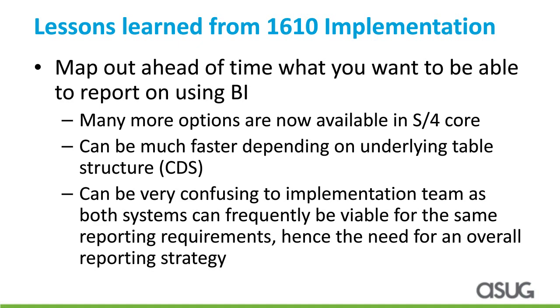Exactly. Some of that challenge that Sean mentions is specific to Delta Faucet, because in our historical platforms, we had no capability to do any reporting out of the ERP system. So the mindset of all of our business users was, if I need to do any reporting, it's got to come from a BI system. Retraining all of our internal team, because that isn't necessarily the case in our new platform, is something, honestly, that we're still working through. There was a huge change management effort there. So if you're in a similar situation, I would start that message early and often.